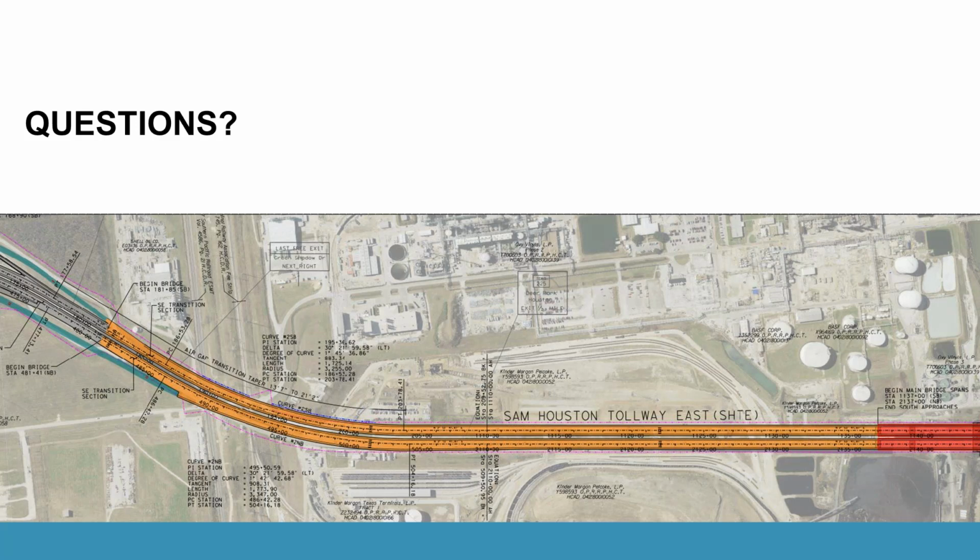So the reason that's advantageous is because it precludes the need for the contractor to excavate and form up and tie the steel and wait for the concrete to cure of a footing proper. So while the shaft is rather large, upwards of 10 foot in diameter at times, especially for the taller column heights, it just saves a large amount of time, and time is money. Time is always money.